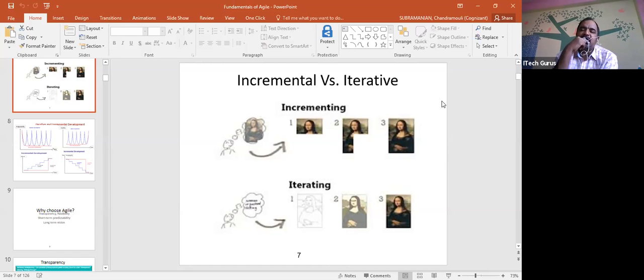But you see that Agile says that it's not a matter whether it is simple or medium or tough, but which is adding more value to the end user, do it at the beginning. Hope you are able to change the mindset, correct? The Agile approach completely changes the mindset of the people. Don't say it is simple, medium, and complex, or what is easy or difficult for you, but rather what is adding more value to the customer, do it first. Then lesser value, then no value. That is an order. So the order is based on the value. So we deliver value to the customer early. I hope all of you are able to understand this.